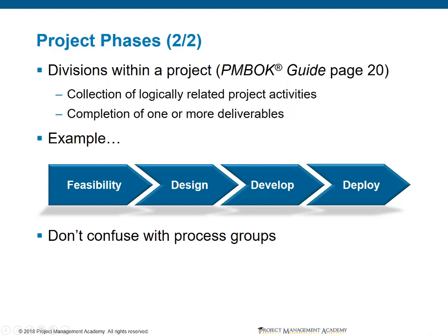This would go into our design phase. This is where we would actually go ahead and have the engineers start putting together a prototype. The prototype, when completed, we would evaluate with our stakeholders and determine whether this would deliver value to them. If yes, it would become an input to the develop phase. Here we would further streamline it and fulfill any further requirements that we have, eventually moving to the deployment phase. At the end of this, all of the deliverables from the preceding phases are being added to incrementally until we have a completed project deliverable that gives our customer some type of value.